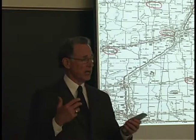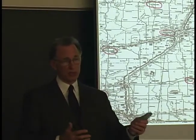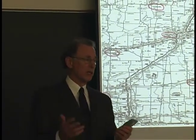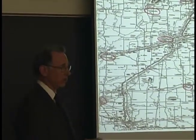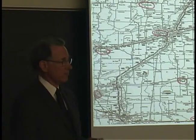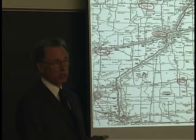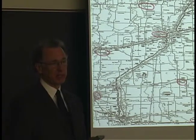And so if you don't have in your mind the fact that that big a structure is going to take more than 350 cubic yards of concrete, you can be left holding the bag for an additional 30 yards, or if you've made a really big mistake, an additional 100 yards of concrete. And that square yard price may be as much as $100 a square yard. So you've got to have a gut feeling as to what it's going to cost.